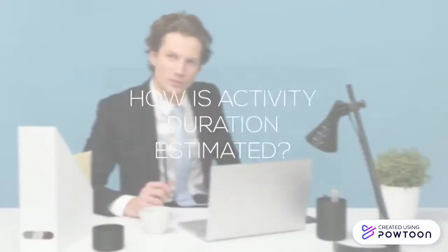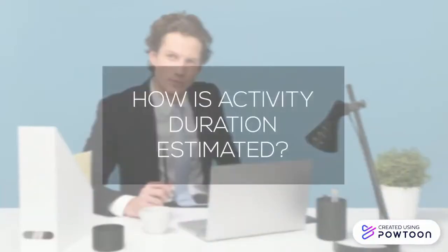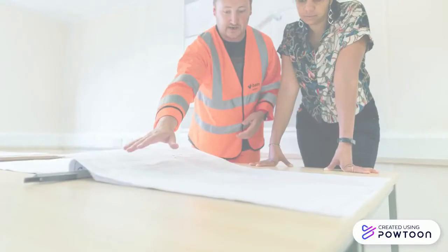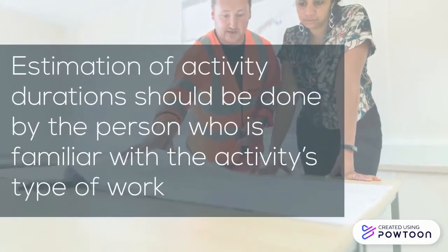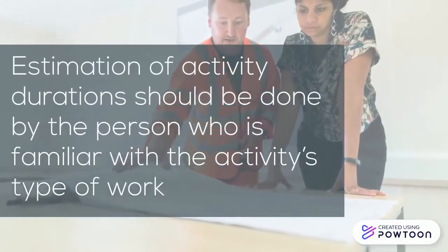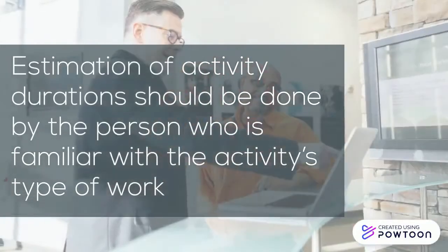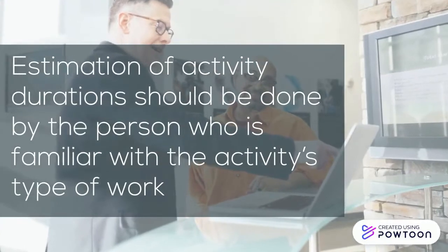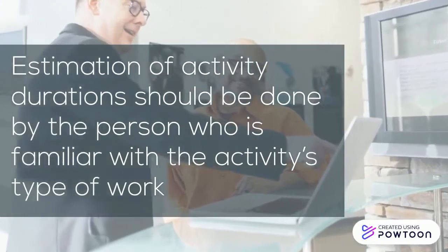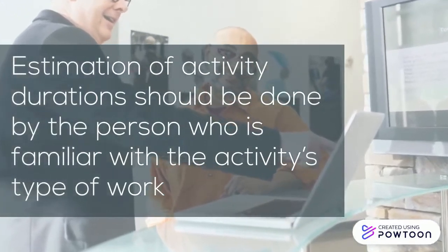With that said, how is activity duration estimated? The estimation of activity durations should generally be done by the person who is the most familiar with the activity's type of work. This is even more important if an estimation technique is used that relies on the expertise and experience of the estimators instead of the historical data.